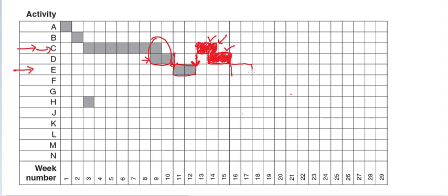Now the integration testing is going to start once again, and this is going to require 2 weeks. So what we have done is we have fixed this part of the Gantt chart. This was the initial idea, in gray, but what we are doing now in red is the actual progress. So this is what's happening right now.